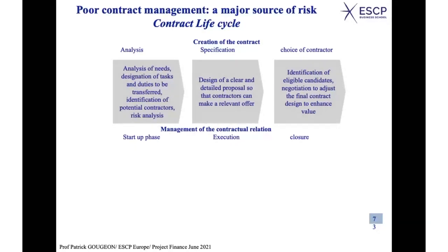Those who are in charge of purchases tend usually, even if they say it's not that much the case, to look at low prices. They look at good value for money, but good value very often means low prices for the service. And you have to be careful because you probably know the story. If you pay peanuts, you get monkeys. So if you just look at the low price of the service, it may not be a good way to do it. But you always have people within the company, those who are looking at the accounts and so on, who try to push for a low price of the service.